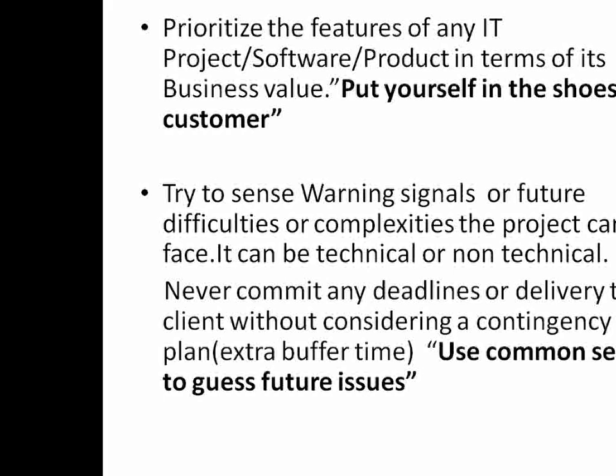Because see, anything can happen in the future. The technology I am using might become obsolete. Okay, the tool I am using, the company which developed the tool, the company closes down. Anything can happen, just imagine. So I have to have some disaster recovery contingency plan, say 5 to 10% of my time. And then only I should give some deadlines or commitment to the client.